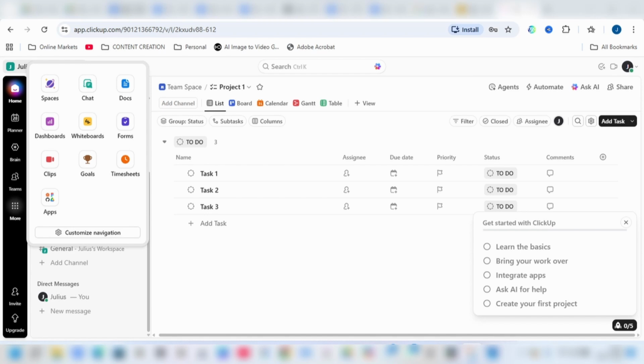And when it comes to automations, this is a great integration in ClickUp. This is how you get to stop doing repetitive work. You can set up simple recipes. If a task status changes to complete, then change the assignee to reviewer. Now, the free plan offers enough basic automations to handle simple status updates and notifications, freeing up your mental energy for important work.